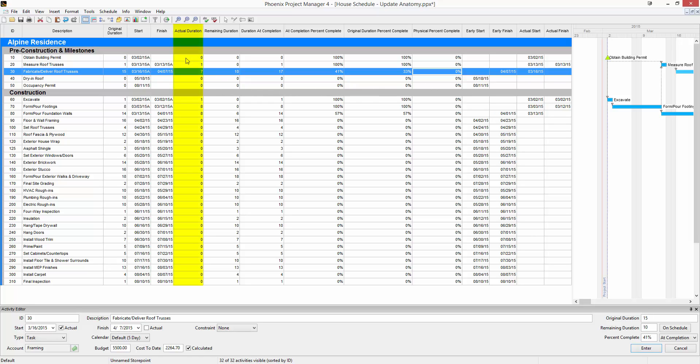There's the actual duration. This is that blue part of the bar or completed work. There's remaining duration. This is the green or red part of the bar or incomplete work.